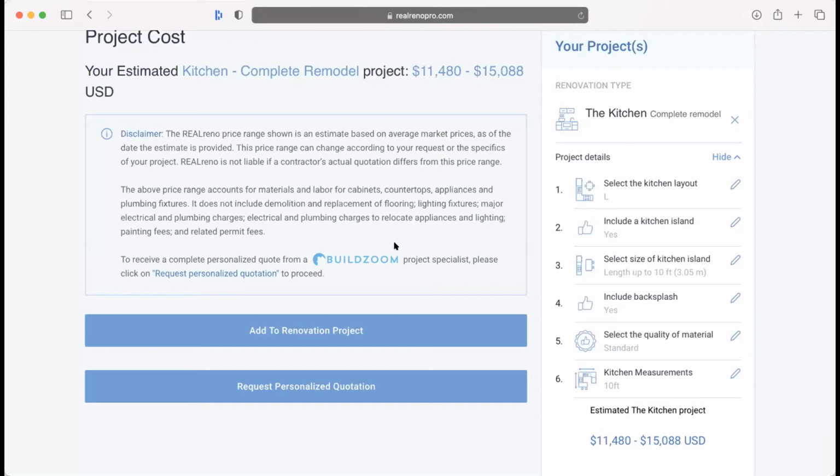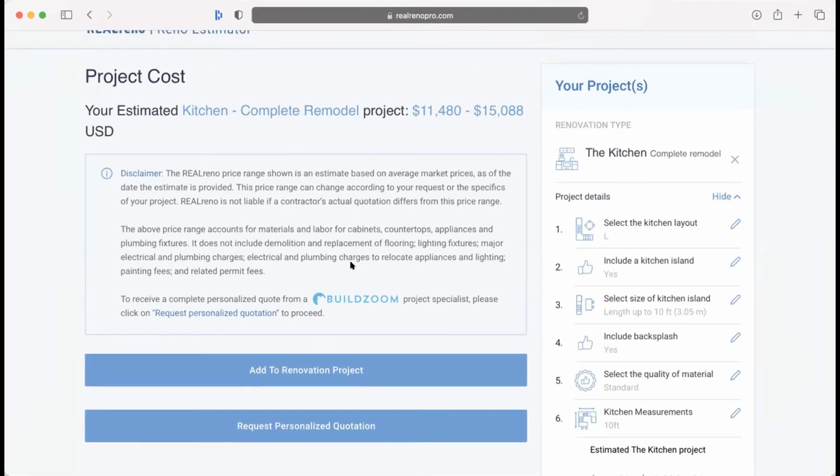So, we know some of our partners are building homes in Florida at $90 a square foot. And up here, those homes are running $200 or $240 a square foot up in the Chicagoland area. So between the material and the labor, prices can vary dramatically.